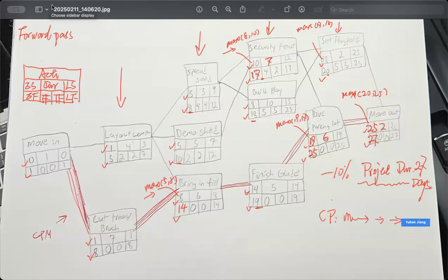Those information are the required things. And you already did the highlight things here. So you don't need to show 3 lines over here, you only need to show a double line here, or you can use a highlight. So that's fine. So this is 10%, and this is 10%. If I'm grading you, you already lose 20% because you do not have those 2 statements. All right, so I'm changing to another color, blue, and going with the backward pass.